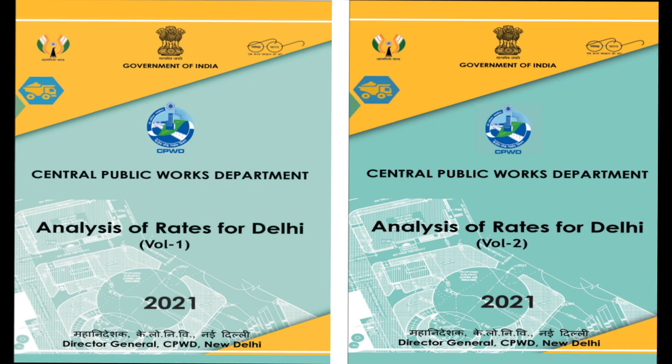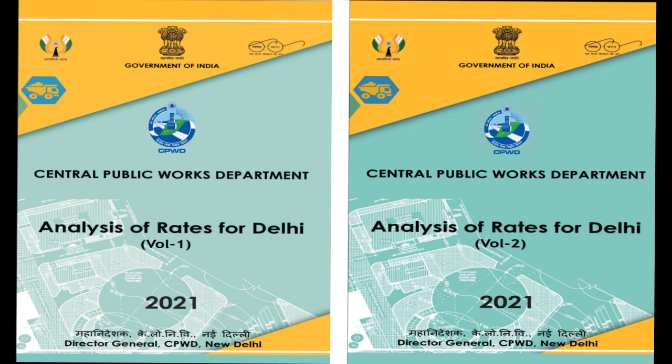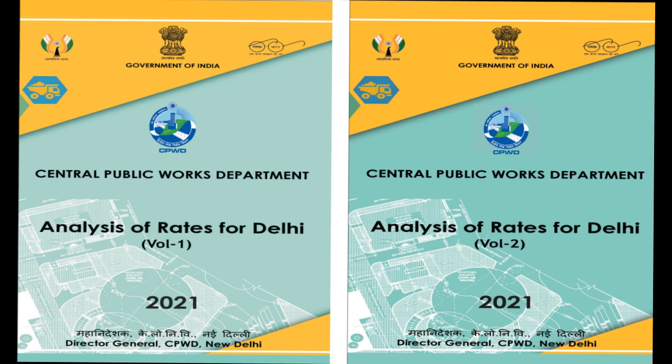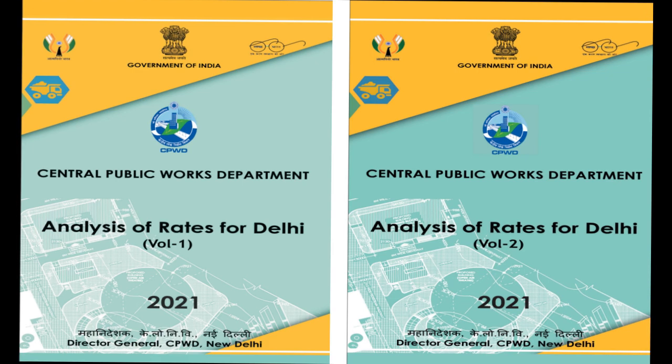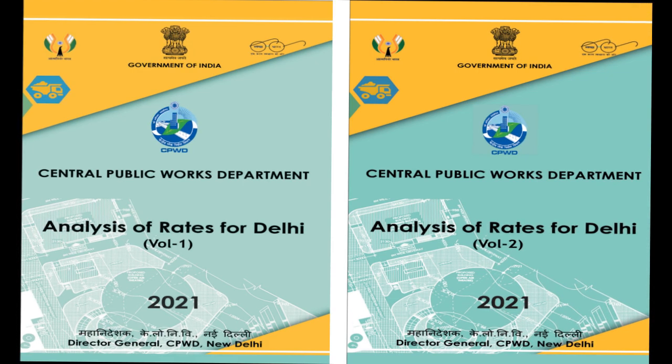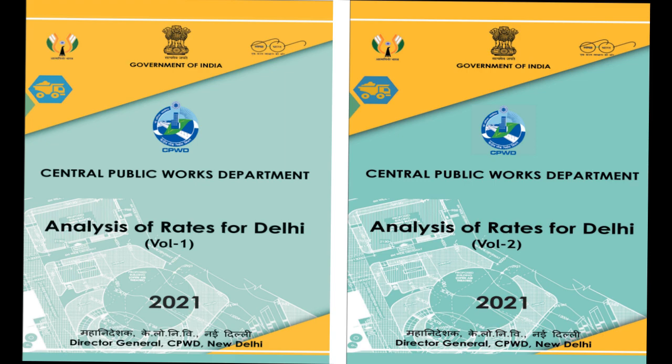As stated, attempt has been made to extract the description of items, units and rates from this DSR, developing an Excel workbook. Under various subheads of DSR items, one has to select the number of item code for extracting the data available in the DSR against the code. This also multiplies the unit rate and quantity to obtain the amount for the item.